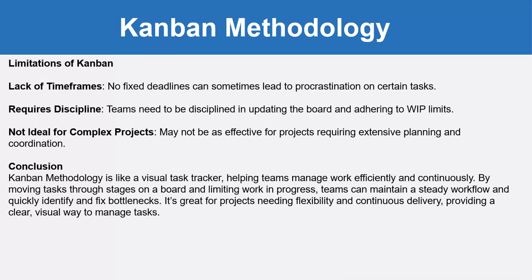Friend, Kanban methodology is like a visual task tracker. Like you are just creating a tracker helping teams manage work efficiently and continuously. The most important factor here is the visual representation of tasks. By moving tasks through the stages on a board and limiting work in progress, teams can maintain a steady workflow and quickly identify and fix bottlenecks and issues. It's great for projects needing flexibility and continuous delivery, and again providing a very clear and visual representation to manage the tasks.